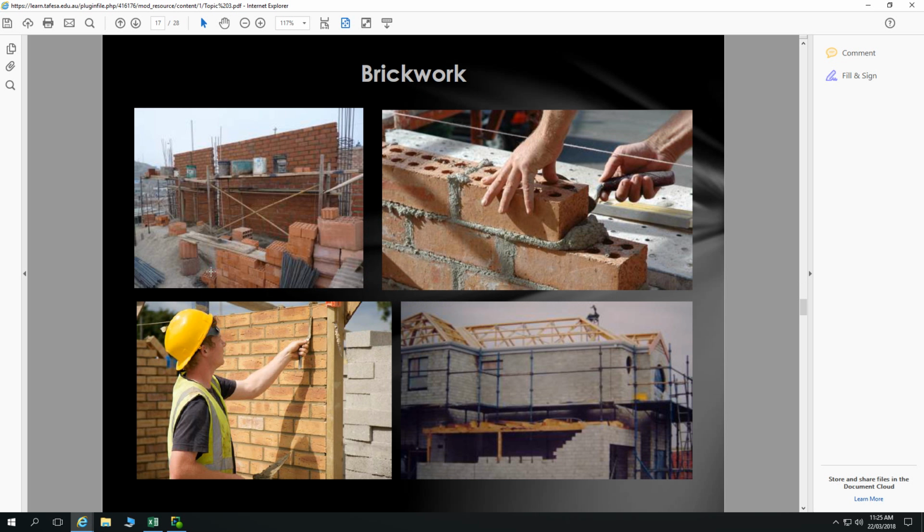and then we may do the roofing before the brickwork, or the brickwork before the roofing. One of those things, or they may happen consecutively as well. If it's a tile roof, you probably do not want any other trades on site while the roof tiling is happening. Has anybody seen a tile roof going on? It is chaos. Well, it's not chaos. They know what they're doing, but there are people cutting tiles, chucking down tiles, going, nah, bad tile, bad. You got stuff typically going everywhere when you're tiling a roof. Don't want other trades on site where that's happening.